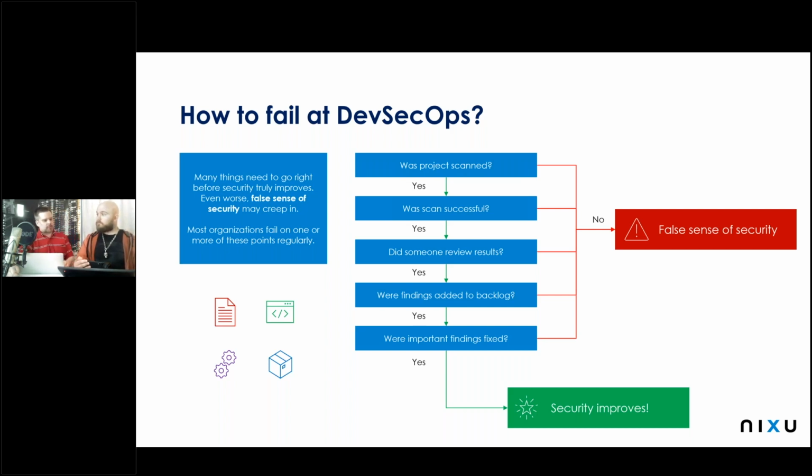So of course, someone needs to be looking at the results. First, you would begin with looking at the scan results and then getting those valid results to teams' backlogs, because the team backlog or product backlog is typically the way to actually get things done. If they are in some report or some other place, the team is not seeing them, they are not taking those into their planning and actual work schedules.